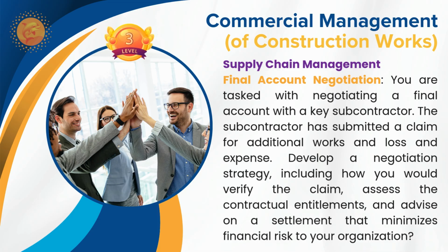There is no standard provision available within the contract. That means as per FIDIC, which is what we most commonly use, when it comes to a nominated subcontractor, the payment terms can be on a back-to-back basis, and the interim payment duration can be agreed between the contractor and the subcontractor.